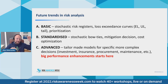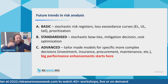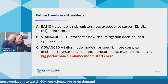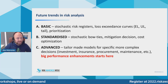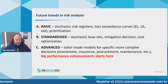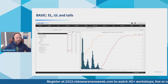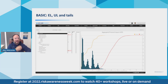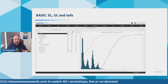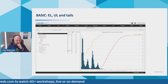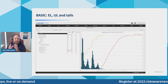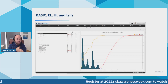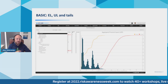We actually improved the quality of coverage — sometimes five times, sometimes two times — significantly improving the quality of coverage without sacrifices in the actual quality of coverage. So, first, at the basic level: you can take your risk register and turn it into a stochastic risk register by replacing your probabilities with distributions of frequencies and by replacing your impacts with ranges of impacts, and then simulating.